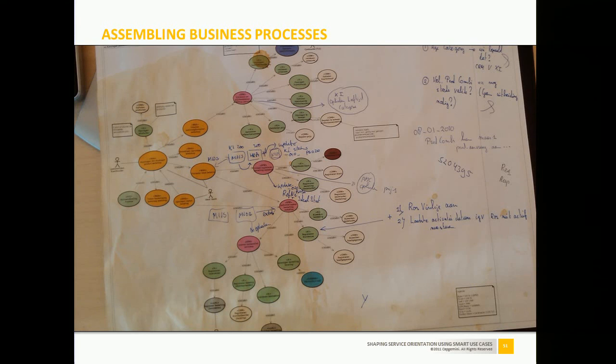since we also know how many hours we took to build all these use cases, we came up with the number of hours per smart use case point. And we also came up with the number of smart use case points per iteration. So after 6 iterations, the product owner in this project came up to us and said, you know what, I actually would like very much to add a new business process to the scope of the project. Usually when you're 3/4 into a project, you don't do that. But since this is an Agile project, we said, okay, let's try to identify how much work this will cost us.